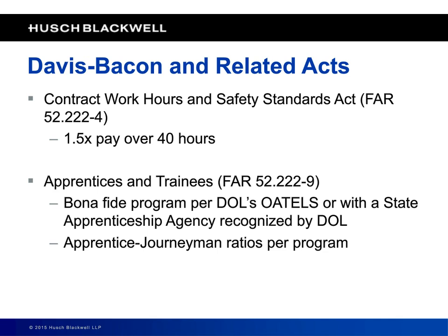It does not, the two don't necessarily have to align. You can have your work week start on Monday, the sub can have his start on Wednesday. However, this is critical, don't change your work week in the middle of the job. If you do, the Department of Labor is going to become convinced that you're trying to gerrymander it so that you avoid paying overtime during a week. So once you establish your work week or your sub establishes what its work week is going to be, they have to stick to it during the course of the project.